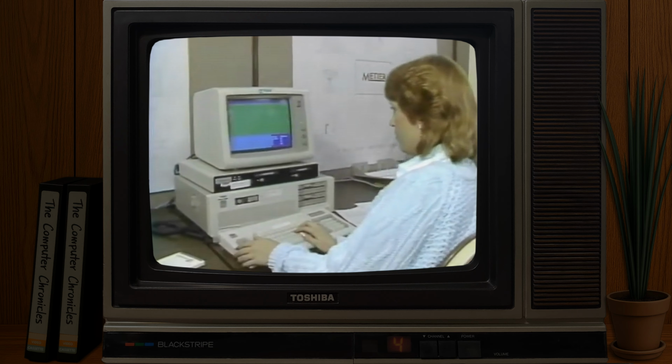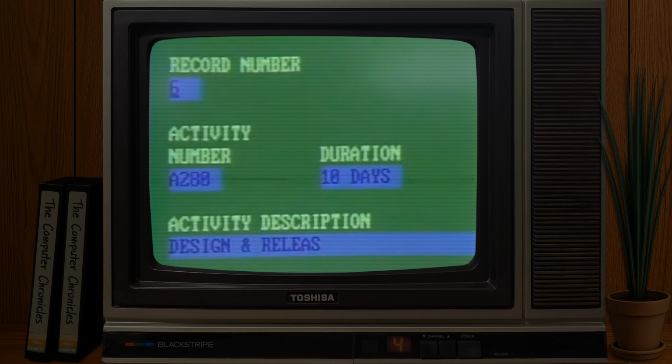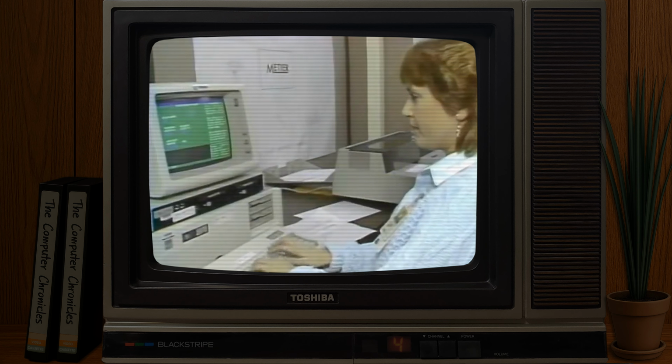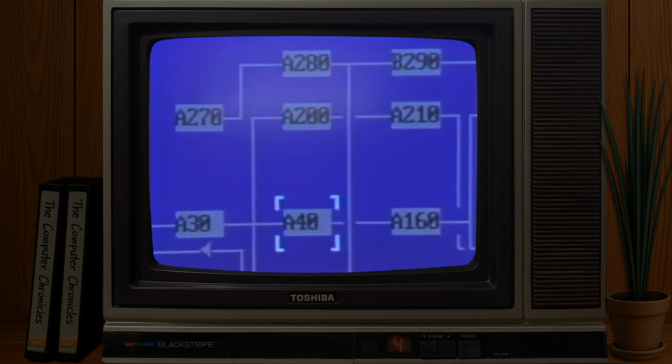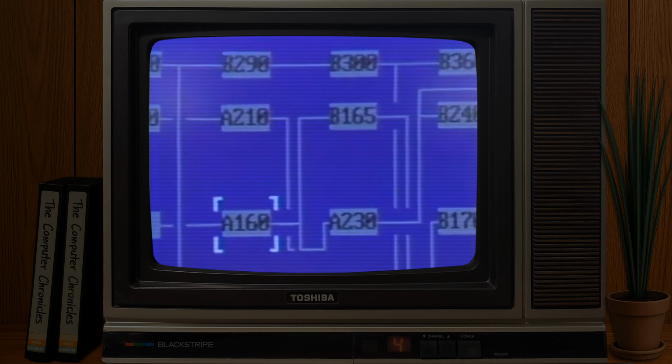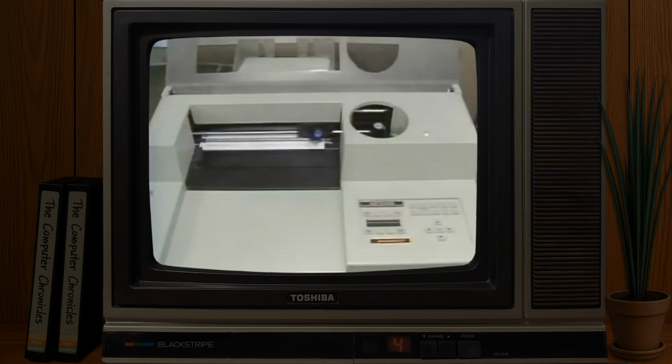The system is based on CPM, or Critical Path Method, to establish the proper order and relationship of each individual task. CPM is an extension of the PERT chart, or Program Evaluation Review Technique. What this translates to on a computer screen is a network of boxed events interconnected according to their priority and scheduled completion. The critical path is the main route to completion of the project, from which lesser tasks branch off.